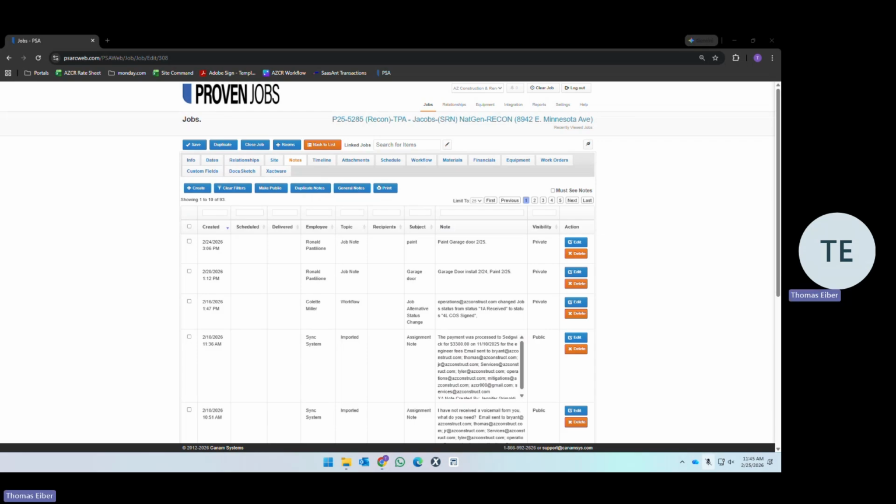Next, along with progress updates, the change order details will be provided in PSA. Anytime there's a change order, you're going to be informing the estimator. So same thing that you did to inform operations, you can tag the specific estimator with the change order details that you're requesting.